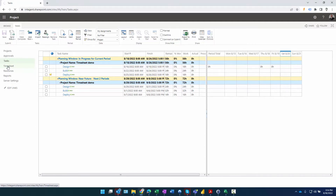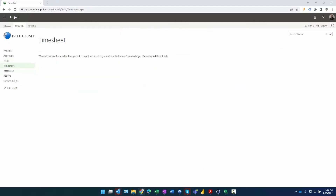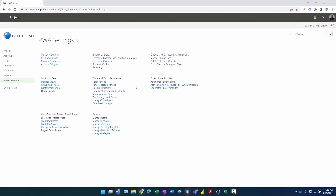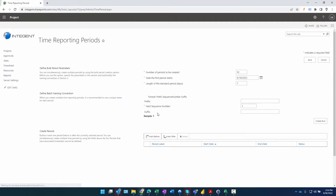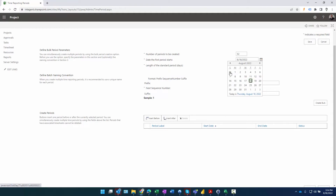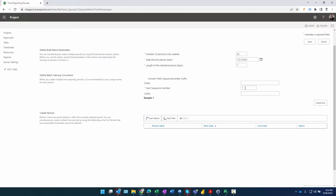Right now, when I click on Timesheets it's not functioning because I need to create time periods. Let's start doing some configuration under Time Reporting Periods. We'll create the number of periods - I'll specify some data. I'll select a start date on Sunday with a standard seven-day period.